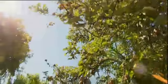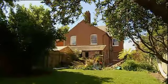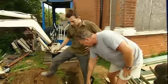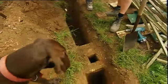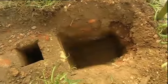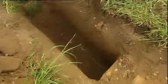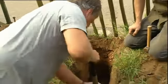Great. Making money on side deals like this can seem a godsend, but you should seal the deal in writing. Make sure you don't accept responsibility for any maintenance work and that the position of the pipe is clearly marked on your plans. For about £200, a solicitor will draw up an agreement, and that's money well spent. Mike is still £2,500 better off.